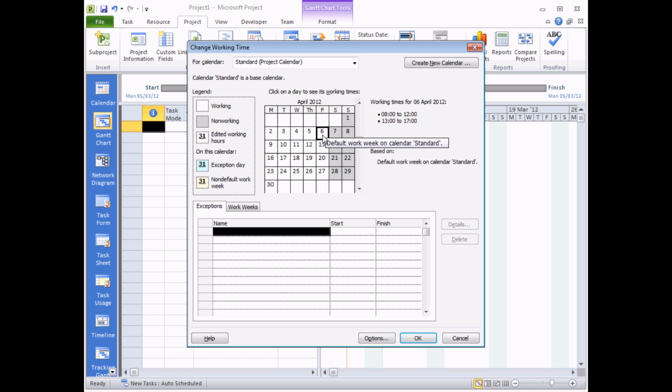exception for. So this Friday, 6th of April, is going to be Good Friday in the UK. So here we go, I'm going to type in the exceptions list down here, Good Friday, and hit enter. Now that creates Good Friday and sets Good Friday, the Friday the 6th, to be a non-working day.